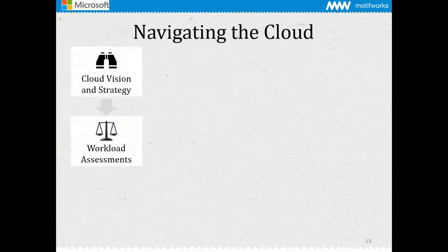Next is the workload assessments. You should do a server and application inventory. You should look at your past and projected growth of the number of applications and the data. Are you planning to develop new applications down the line? Are you retiring existing applications? And all this information will form the basis of a cloud strategy.